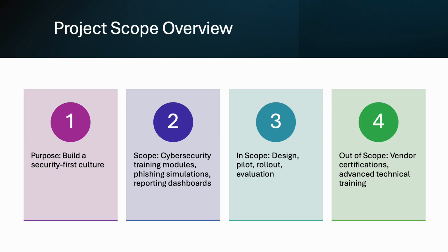Scope definition also creates accountability. It allows the project manager to measure whether the project stayed within its defined boundaries and whether the promised deliverables were actually provided. For example, if a scope promises phishing simulation, leadership can evaluate whether those simulations were developed, deployed, and assessed by the end of the project.